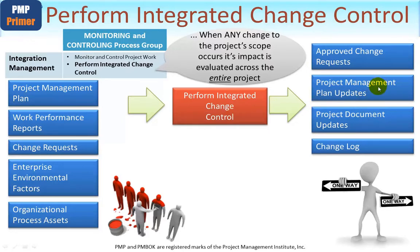As a consequence of approving any change requests, there will be updates needed to the project management plan and its various sections, as well as updates to other project documents. For example, if you have an issue log or a change register, these would need to be updated as well. Most importantly, the change log — this is where all changes, their status, and their history are captured. The change log is an important management tool to make sure that changes are done under control.